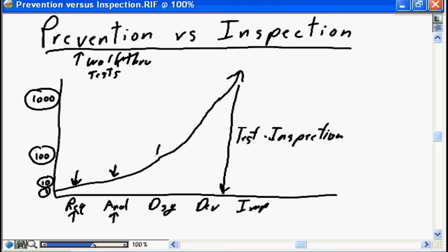Similarly, if we don't find it until we're in design, at the $100 level, we're now going back, having to rework and potentially even redesign components for our project to ensure the new requirement fits in, on through development where we have to undo some work that's already been done for the project, and then we have to redo, and so on.